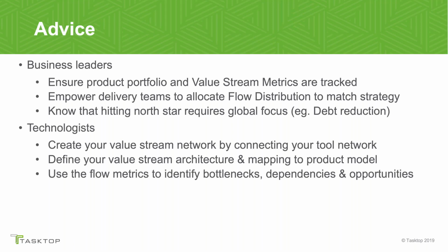For your technology folks out there, create your value stream network by connecting to your tool network, which means even though you're using the same tools to do all of your development, your value streams are going to be different for each product line. An example is some of your teams are working on the mobile app, some of the teams are working on something for finance, some of the teams are working on the web app or the web page. So each of those is a different value stream, even though it's the same tool network, you're using your tools differently.